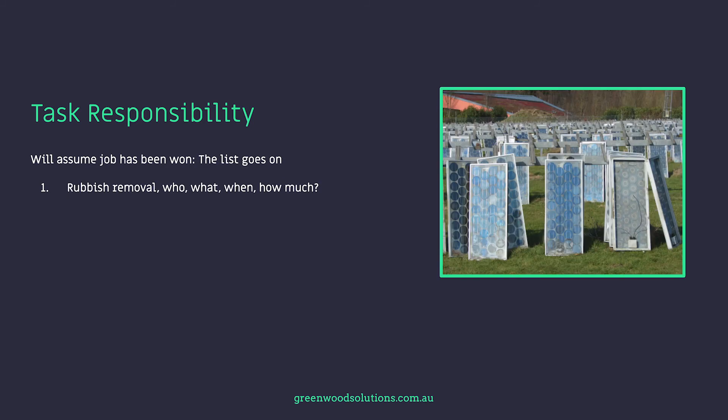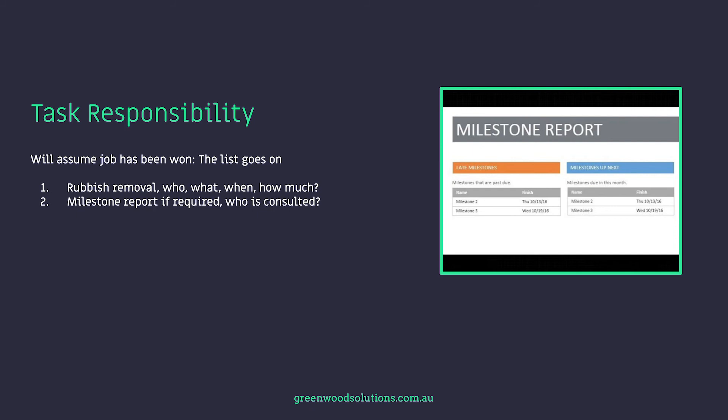A big consideration on commercial jobs is rubbish removal. On domestic jobs the rubbish goes in the back of the van or trailer and off it goes. But on commercial jobs we're talking pallets worth of waste. Not only do we have to remove that rubbish, we have to account for it in our costs.